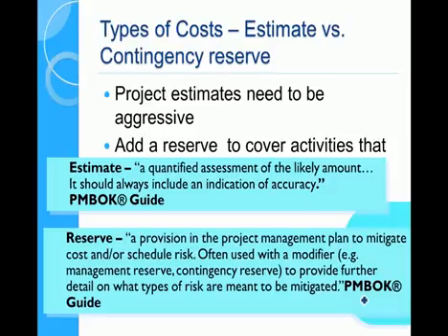What usually happens is a 10 to 20% reserve is kept, if we're being official about this, by the sponsor. So the sponsor will pay the project the estimated cost, and then hold on to the contingency cost, which the project or the project manager can request comes into the project. However, that's only really for some types of contracts.